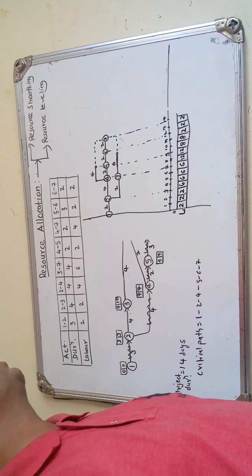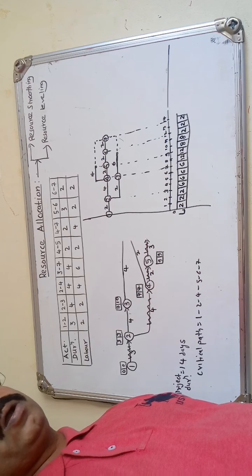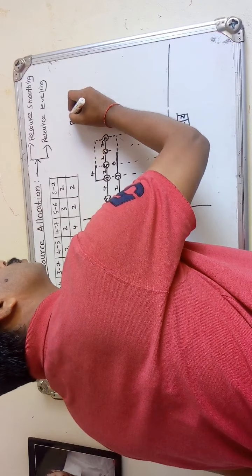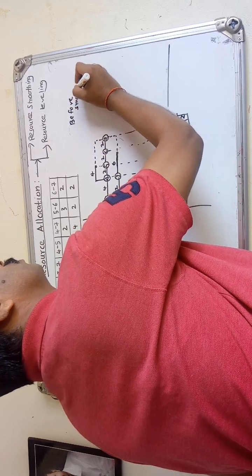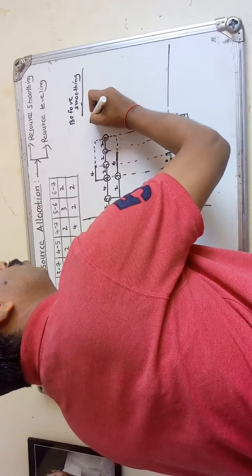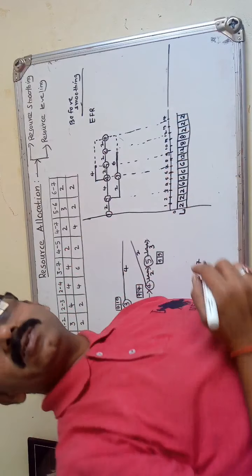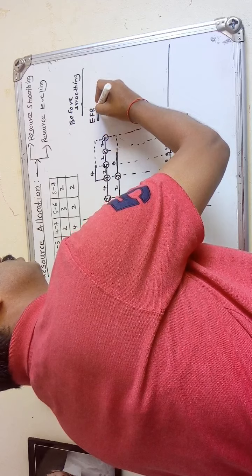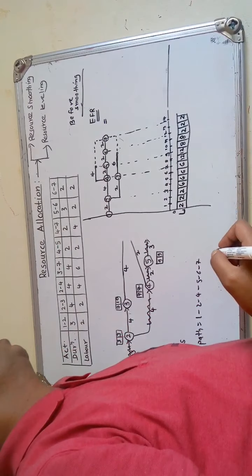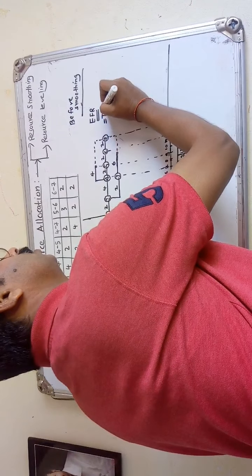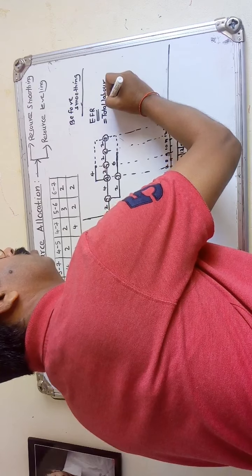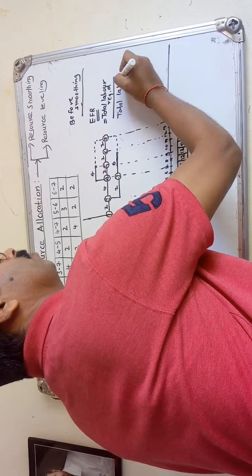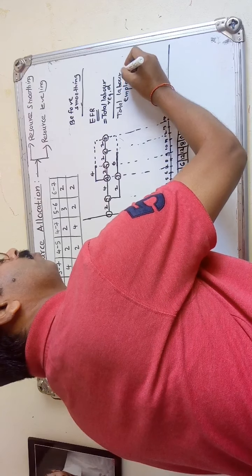Now what is the initial or effective force ratio, actual, before smoothing? Before smoothing you have to find out that effective force ratio. It is also known as the initial force ratio before smoothing. So that EFR is found out as total labor required upon total labor employed, into 100. So it is expressed in percentage.